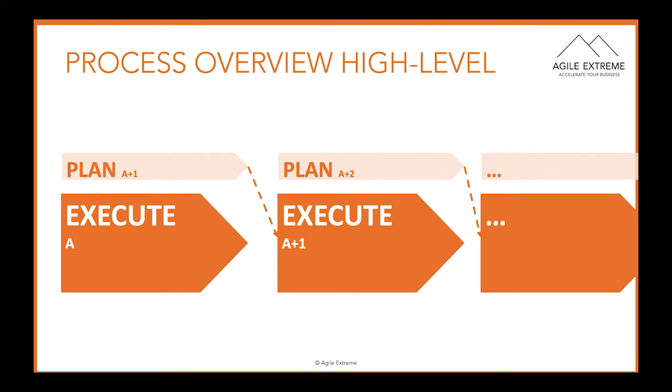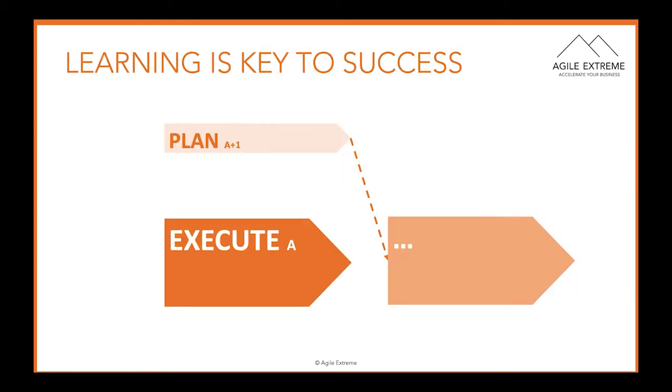So what we're seeing here is that while we're executing and spending 90% of our time doing stuff, not thinking about things, not analyzing things, we're building things during execute. We're also spending about 10% of our time planning, preparing for the next round of execution. And we do that on the quarter level and on the sprint level. So it's the same pattern, the same design pattern.